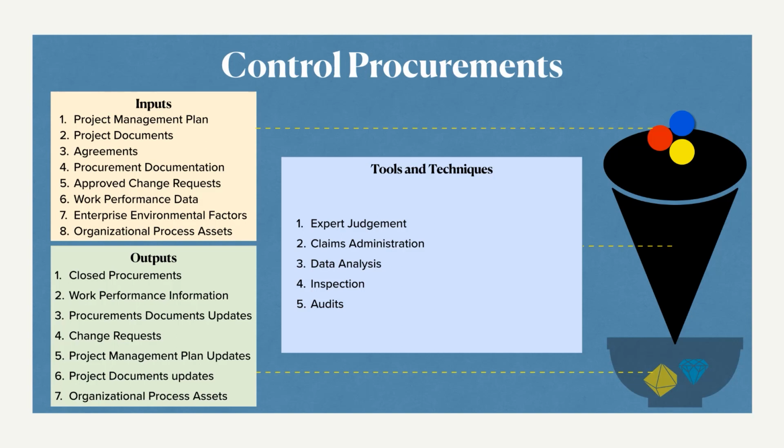The others are similar to the ones we learned before. Data analysis tools, whatever we learned can be applied. There is no limit to it. Inspection methods, multiple inspection methods can be used for monitoring and controlling all the procurement processes. Audits: supplier audits are done by the supplier quality engineers from the buying organization, and sometimes third-party audits are also sought. Certification too, whether they have TUV certification, whether they have ISI certification, right? All the certifications are asked for. So audits are an important technique to assess the vendors.